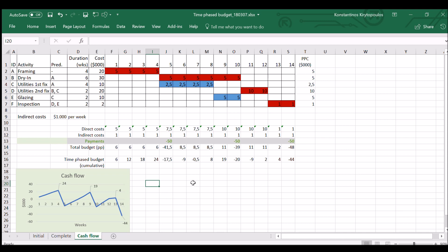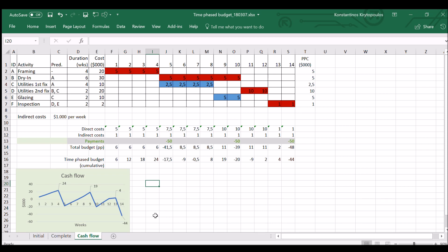That is something that is usually happening in construction projects. So I'm investing money, and then at some point in time I get a payment, and then I go back having a profit here. And then I use this profit and I go up again and I put my money in, and then I get another payment. I have some profit again. And in the end, the last point will tell me the overall profit of the project.